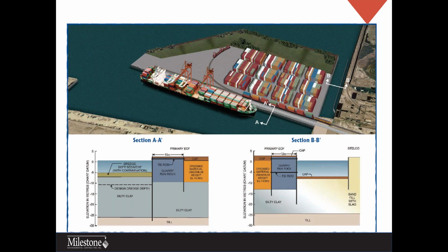Phase 3 of this project will be construction of a multi-layered environmental cap to cover the sediment within the ECF, accompanied with consolidation and dewatering of the sediments. Following this will be construction of several layers of materials, which include aggregates of various sizes and topped by surface asphalt. Next slide, David.